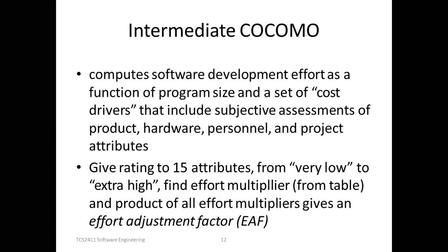Basic COCOMO. Now we're moving towards intermediate COCOMO. Intermediate COCOMO computes software development effort as a function of program size and a set of cost drivers. So it is not only considering those lines of code. Cost drivers are also included, which are assessed based on product, hardware, personnel and project attributes. मतलब ये बोल दिया गया कि effort is not totally dependent on the lines of code. There may be some other factors.